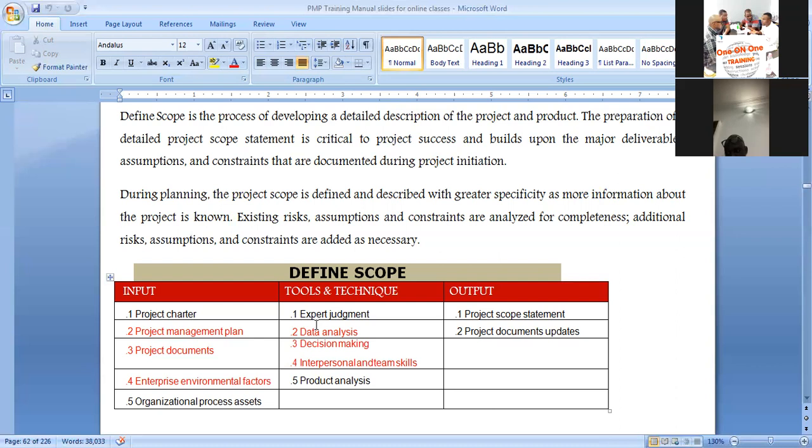So always, when you're being asked to make a quotation, and you go in touch and start asking, what is the price of chippings today? Okay, they say it is about a certain amount. And this is your project. You're not only going to procure your chippings, your aggregates, today. You will buy now, buy in the next 2 months, buy in the next 5 months. You are still going to buy in the next 2 years. If it is a 2 or 5 year project, you are sure of that. And the client wants you to give them financial estimates around that.